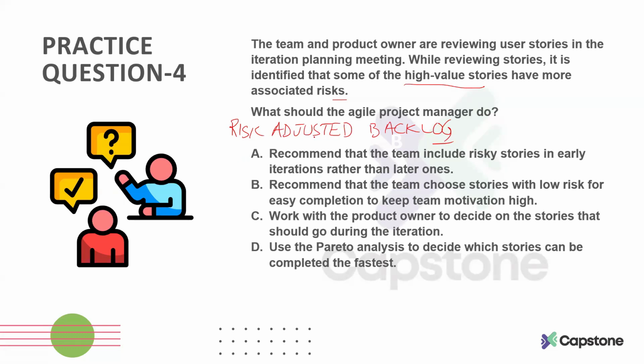And by doing it like this, you inform your stakeholders, your customer, that this is what we think. We think that this user story has some complexity or risk involved around it, so that is why we are going to plan it earlier so that we can develop the understanding about it. Then once we have the understanding, we'll share it with you, and then maybe we can plan it as per the priority recommended by you at that particular time.